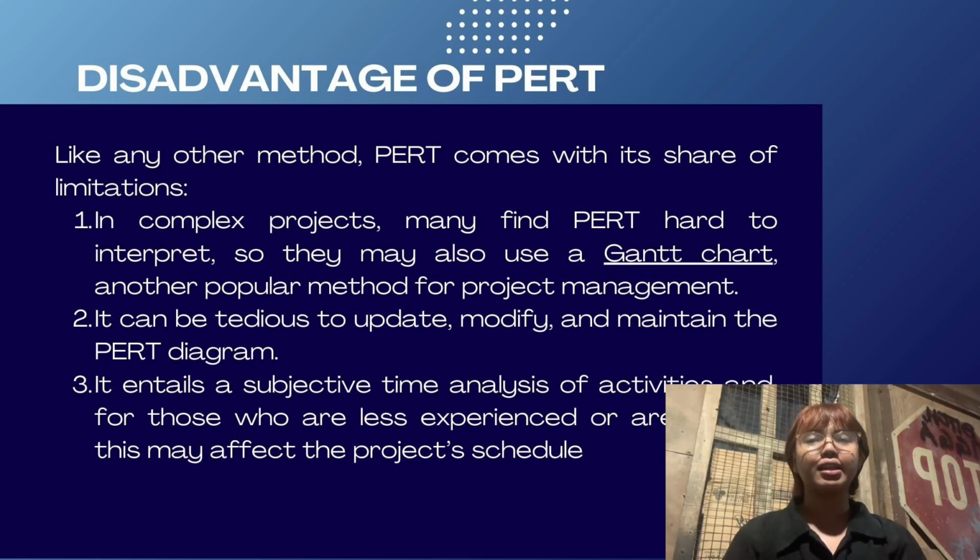Secondly, it can be tedious to update, modify, and maintain the PERT diagram, especially for longer projects with numerous dependencies. And finally, it entails a subjective analysis of activities, and for those who are less experienced with the PERT chart, bias may negatively affect the project schedule's accuracy.